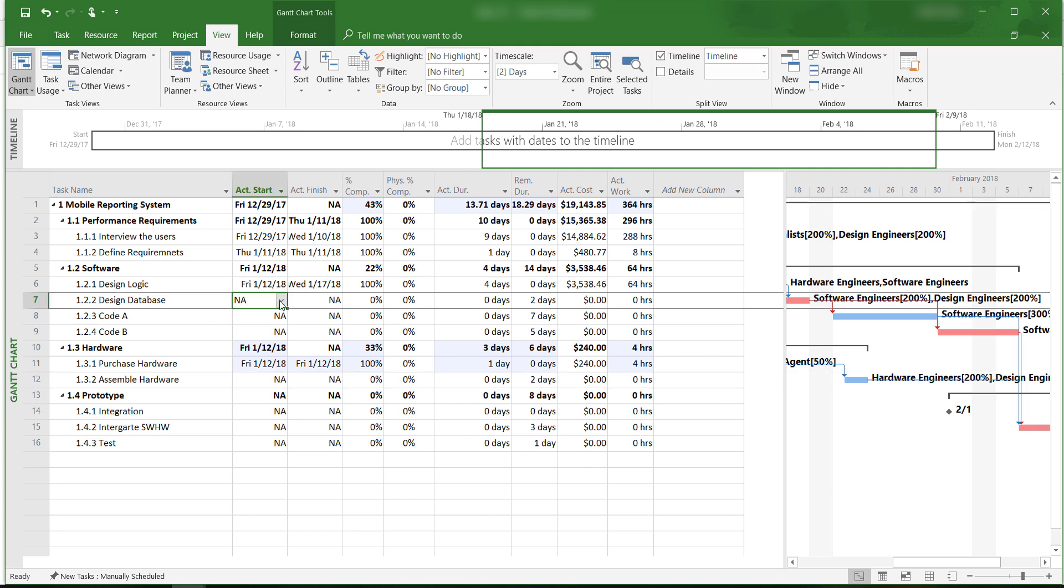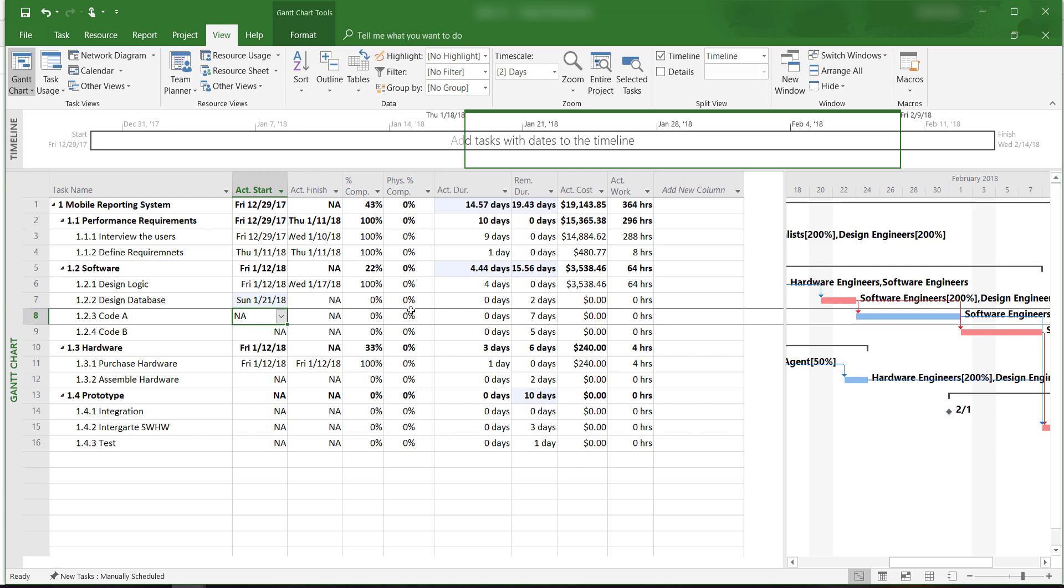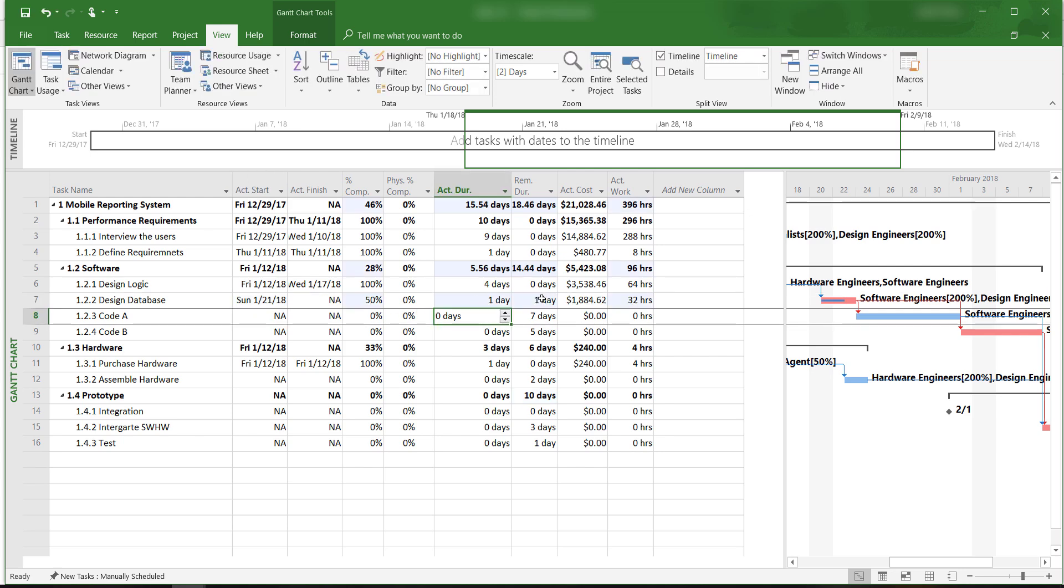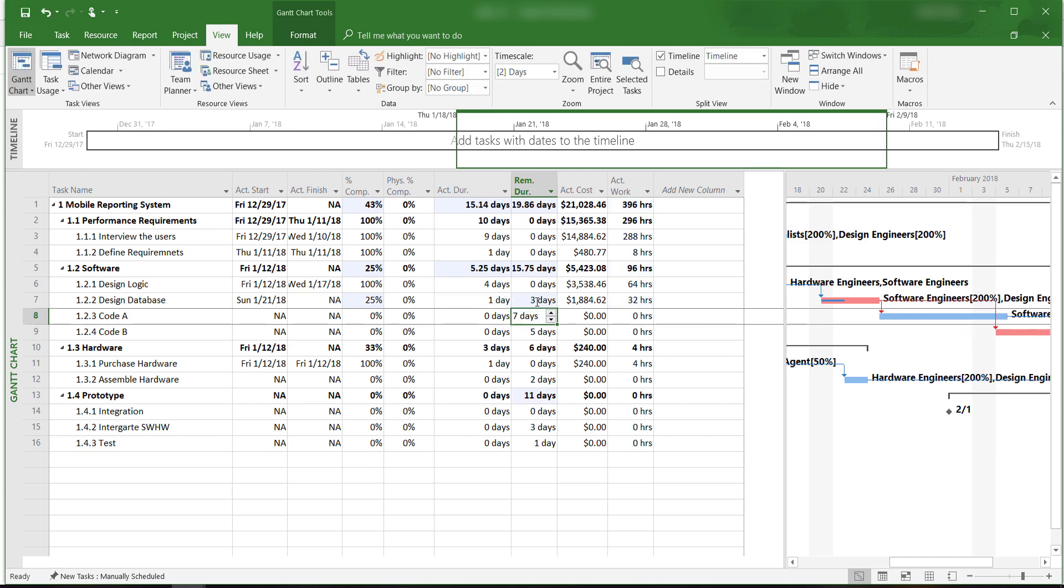Designing the database started on January 21st, and we have actually completed 1 day. But we estimate that the activity will take us 3 more days to complete. The software now shows that design database is 25% complete.